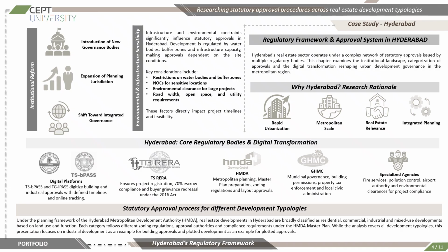TS-bPASS digitizes building approvals and provides online processing with defined timelines, and it works mainly for building developments. Whereas the Telangana State RERA regulates project registration, escrow compliance, and grievance redressal mechanisms. The Hyderabad Metropolitan Development Authority is responsible for metropolitan planning, zoning regulations, and layout approvals. The Greater Hyderabad Municipal Corporation handles municipal governance, building permissions, tax administration, and enforcement functions.